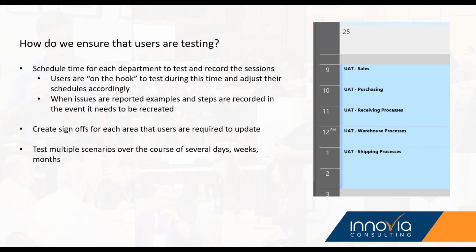All of a sudden it's 6 months later, and that person goes, I don't remember what I'm supposed to do. But if they're doing it regularly, and I'm not saying that a sales team needs to be doing orders every single day, but they should go in there maybe once a week, spend 5 minutes, enter 1 or 2 sales orders. Just keep reminding themselves, especially if there's like a drastic change in the way the process is going.